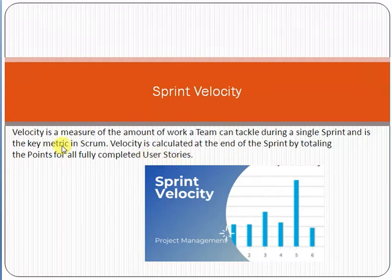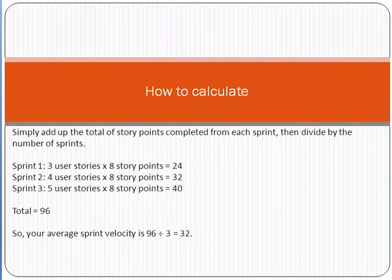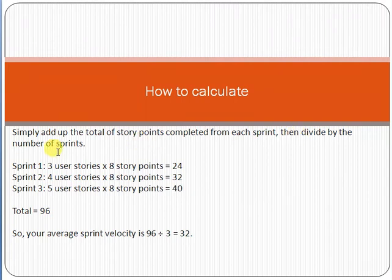How do we calculate sprint velocity? Simply, we add up the total story points completed from each sprint, then divide by the number of sprints. What is a story point? A story point is the estimated number we assign to a user requirement to complete.